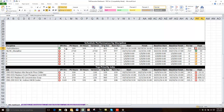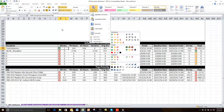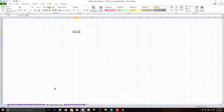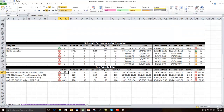Everything comes from P6. However, I did build in conditional formatting on these cells. I highlighted these cells, went up to conditional formatting, and built in some icons. In this example, a 1 or above is considered green, anything from an SPI of 0.9 up to 1 will turn yellow, and these are all reds and zeros right now because there's no data being referenced there at this point. I also put in conditional formatting on the float. Both the discipline performance report and the top priority jobs report I had built as P6 layouts, then converted them into P6 reports — I just had to choose the fields and columns that I wanted.